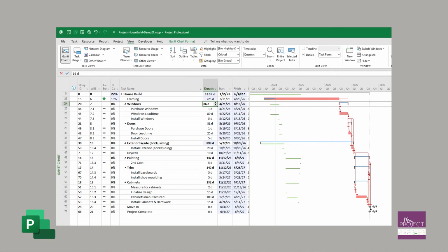Now, the reason why you have this test, this looks pretty simple, and it really is. But if you had any kind of gaps or hard constraints on your critical path that weren't allowing it to be a dynamic model, then this would have broken. It wouldn't have moved out. There would be a gap somewhere. So this is helping you identify where that gap is. You want to make sure that the first part of the critical path and the last part of the critical path move. And if they don't, then that's where you need to go and fix where the problem is.